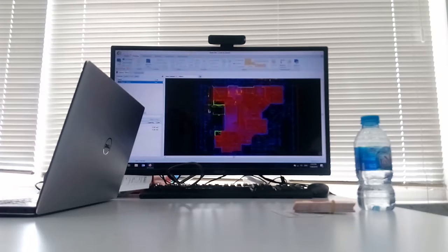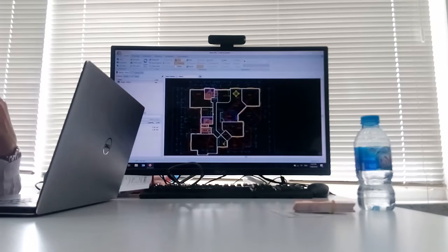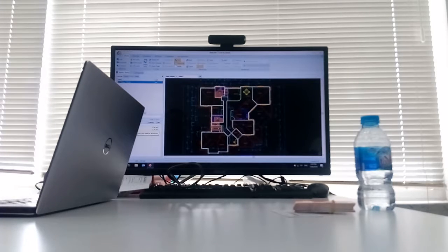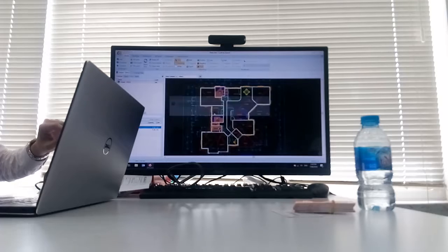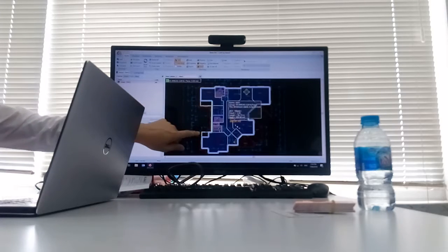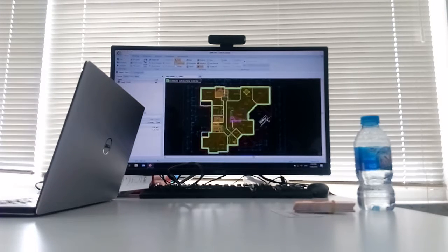Once I close this and you want to confirm the variation, you just select it. You see there is a warning sign and the quantity became 0, because this is a revision. When I click this, the software loads the initial measurement on top of this drawing. From here it's very straightforward. You notice this is a small area you want to amend.